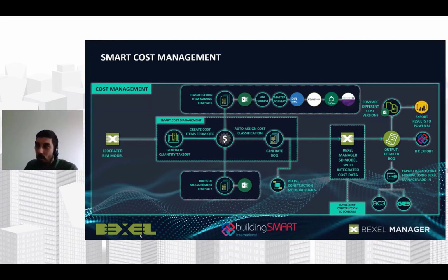Then, based on all of this, you can generate the BOQ and use it, of course, as a 5D backbone of your project, by populating the unit prices into this automatically created cost classification, and then use it to manage the costs in your project in the future.